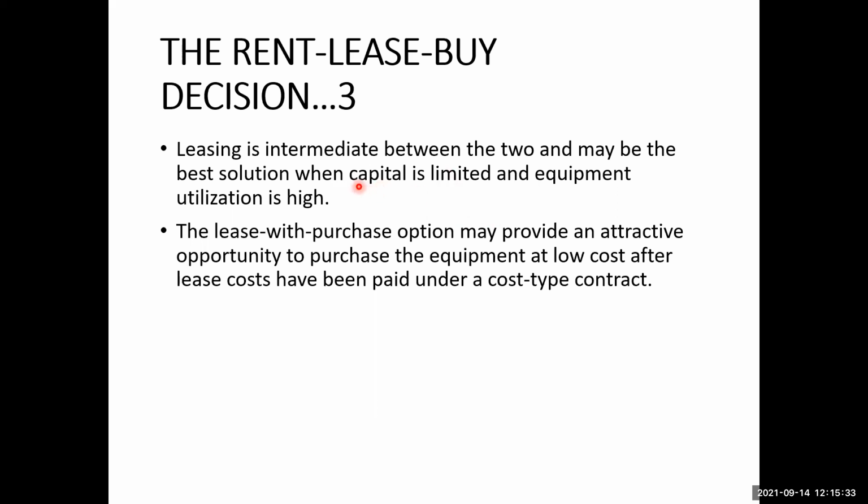So you can choose the leasing option when you don't have enough capital to buy the equipment. You have only that much capital to lease the equipment, and its utilization is also high. But on the other hand, if the utilization of the equipment is not too much, and you don't need the equipment for a longer period of time,